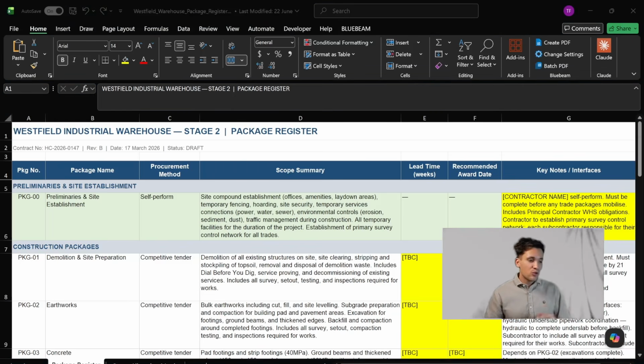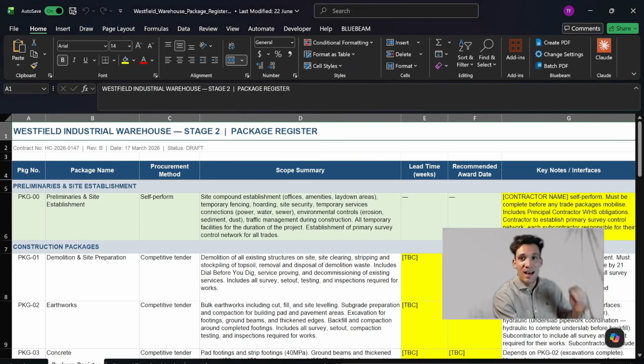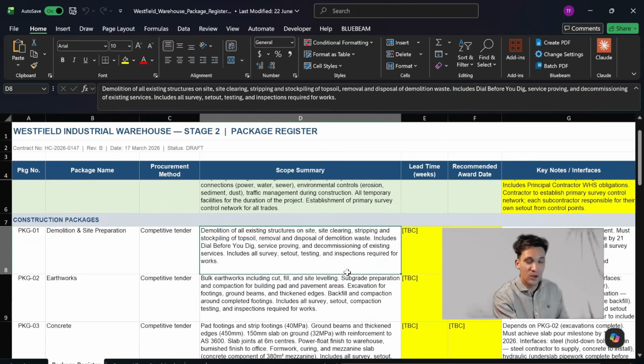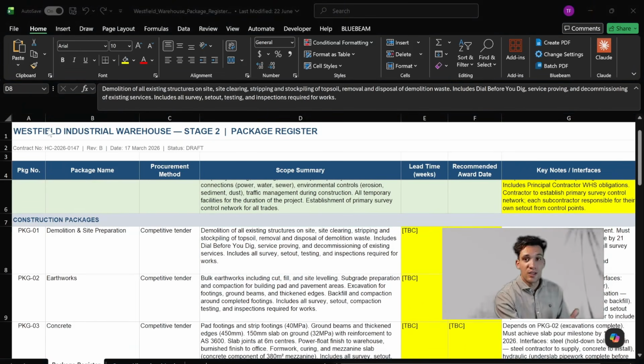For example, for the electrical works, we have to install 23 light fittings and we need to have a defect liability of 2 years, and we have to provide shop drawings and specifications for approval from the architect. All those requirements sit in our head contracts and the supporting documents somewhere. What we're doing through the procurement process is we're really working out what these are and transforming these into sets of scope of works and packages. I refer to this category of tasks as data reformatting. Now, there's obviously a lot more to procurement than that, but that is basically the core process.